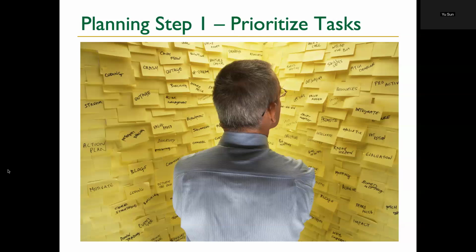I want to find a problem, solve the problem. How do we efficiently organize our schedule? I want to find the best diet for my fitness plan, right? So focus on the problems first. Those tasks and stories are more prioritized, not the non-functional ones. Once you have this launched and start working on promotion, then gradually come back to fix those non-functional issues. So prioritize things.